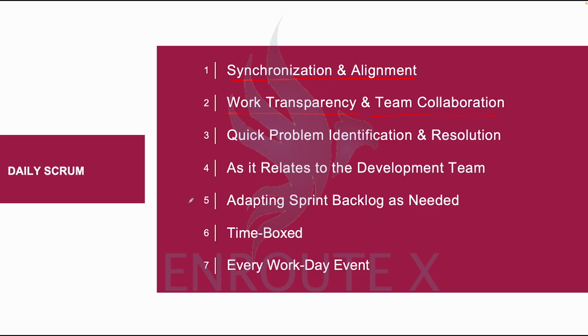So the daily stand-up helps the team to work together, bringing transparency to work, and it also serves as quick problem identification and resolution. I mentioned the 3 focus of the daily stand-up. What was done yesterday, what are we doing today, and if there are any problems.